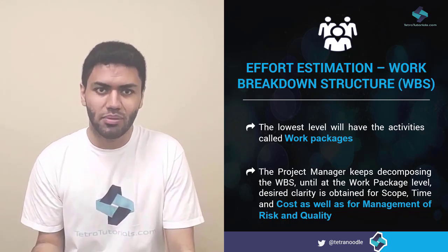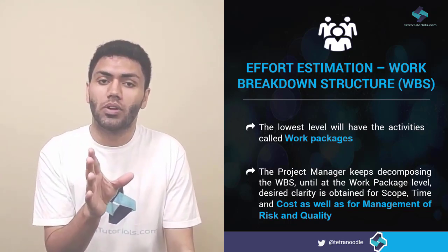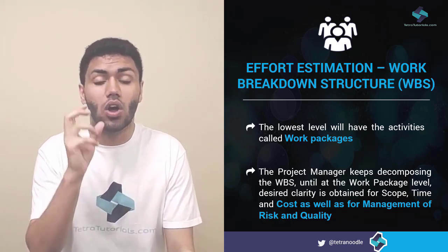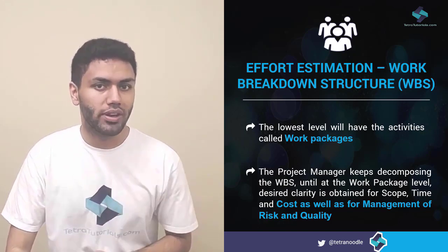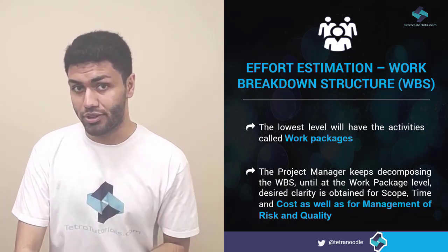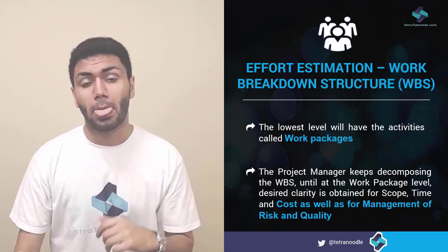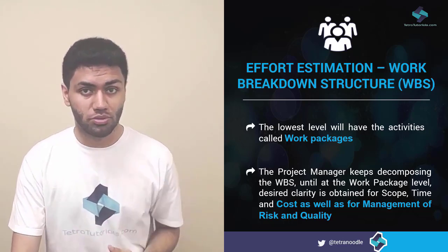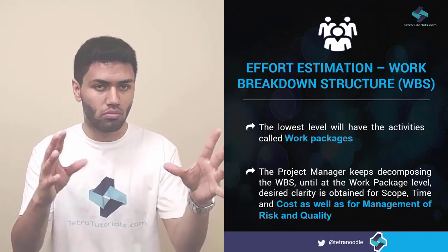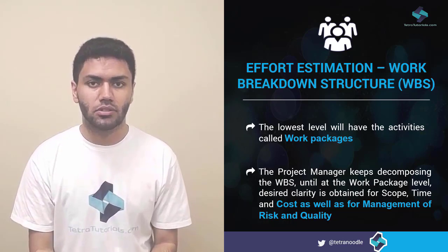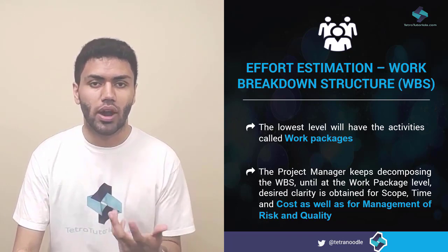Obviously, it's in the best interest of the project and the team if the estimates are as accurate as possible. The accuracy of the estimates depends on the nature of the assumptions, the level of detail with which the work has been broken down, and also on the skill and experience of the team members who came up with estimations. One of the good practices to follow during the estimation process is to get the estimates done by 2 different teams and then take a mean or average of the estimates for planning purposes. This reduces the biases which one team may have and generally leads to more accurate estimates.